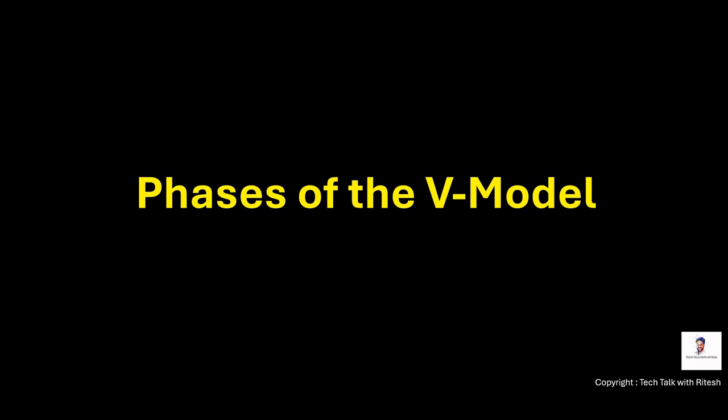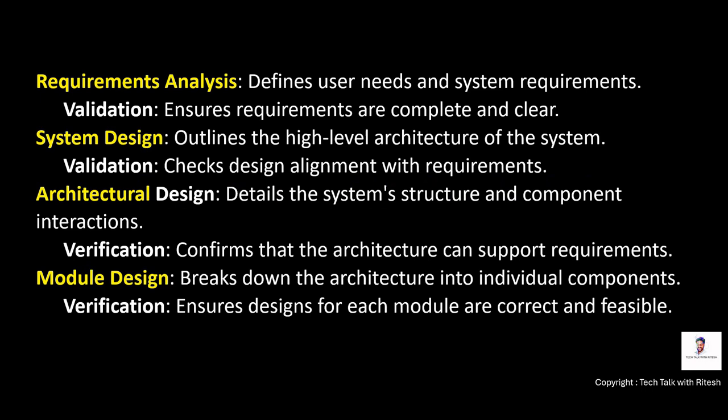So likewise, we have the waterfall model. It is just an extended version of the waterfall model. We have the same phases: requirement analysis, system design, architecture design, the module design, etc. Whatever we have covered, it gives some extra stress on the validation, on the testing phase. So for each development phase, there is a corresponding testing phase.